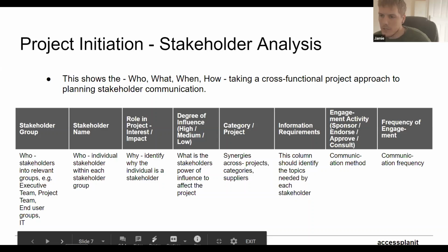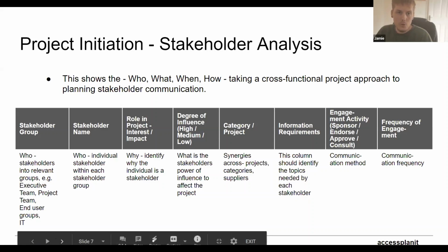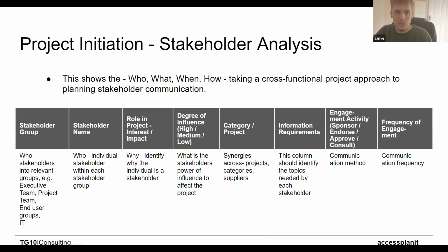I agree. I think there's another important point with stakeholders as well. A common thing that can get missed is that stakeholders aren't just the people using the system, or the workers, or whomever. We were also talking about people who might be affected at all. That might be suppliers, partners, regulators. There's a whole host of people who can be affected by this as well.